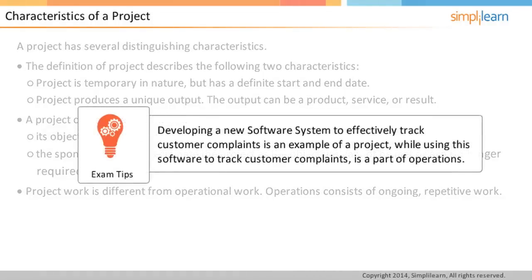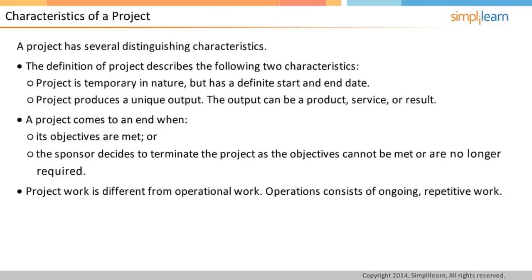Creating a new software system to effectively track your customer complaint can be an example of a project. When the software is successfully developed, the project objective is met, which marks the end of the project. When you start using this software to track customer complaints, you are entering into the operations phase. Let us now look into project management.